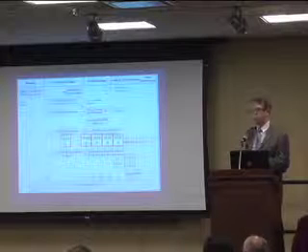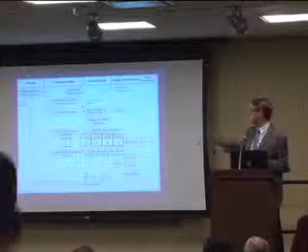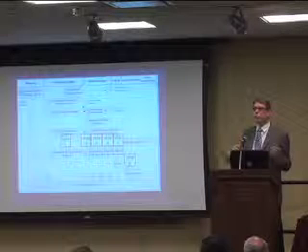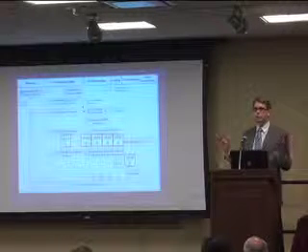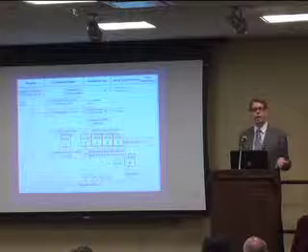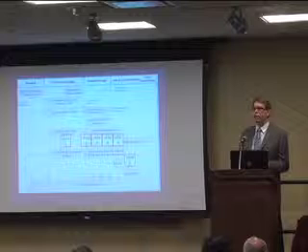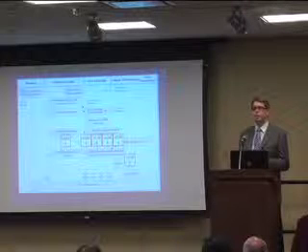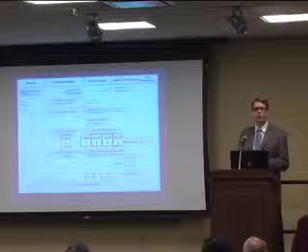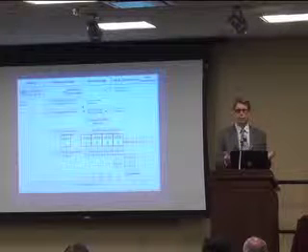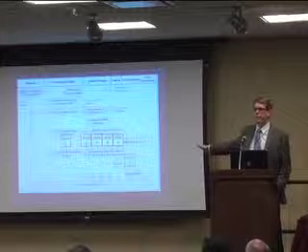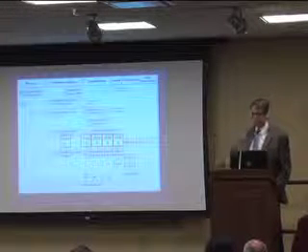Also, the utility conflict management should not stop at the end of the design phase. A lot of times, we talk to folks and they say, okay, this is where my involvement ends, and this is where we start archiving it. But there's a lot of information that gets lost because there's changes made during the construction phase. There's sometimes new conflicts that are encountered. So there should be definitely some update to that matrix during the construction phase.